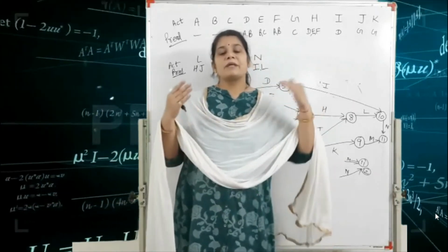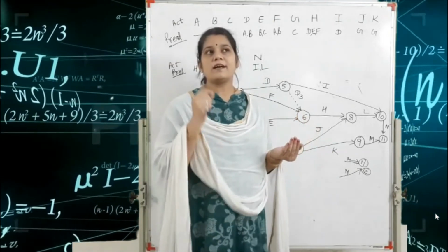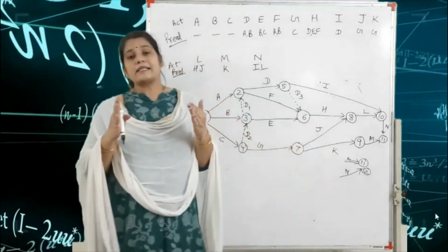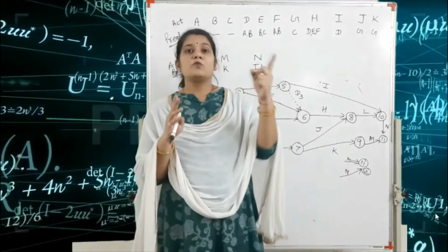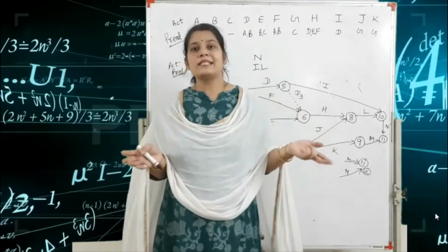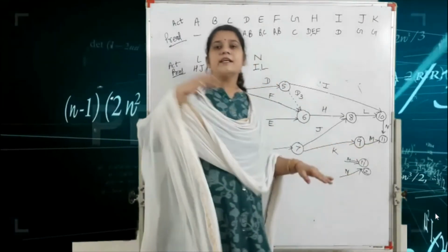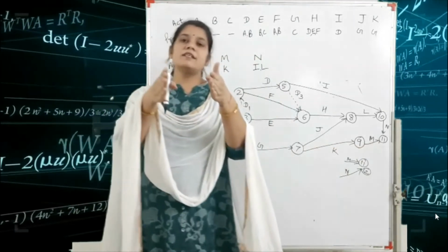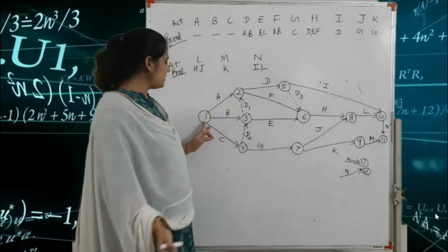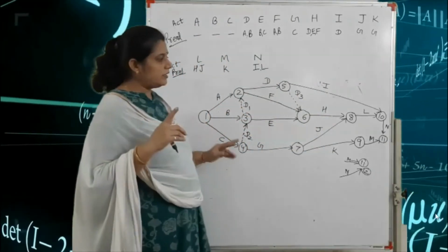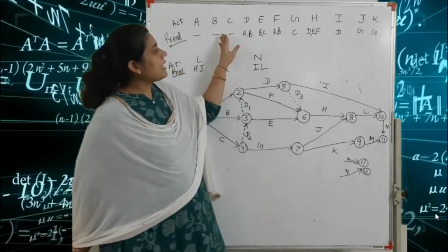So always, for example, a starting and ending point is unique. There are not two nodes for the starting point and not two for the ending point. So at the ending point we always merge all the remaining activities. Here the starting point is 1 and the ending point is 11. So always map the diagram.